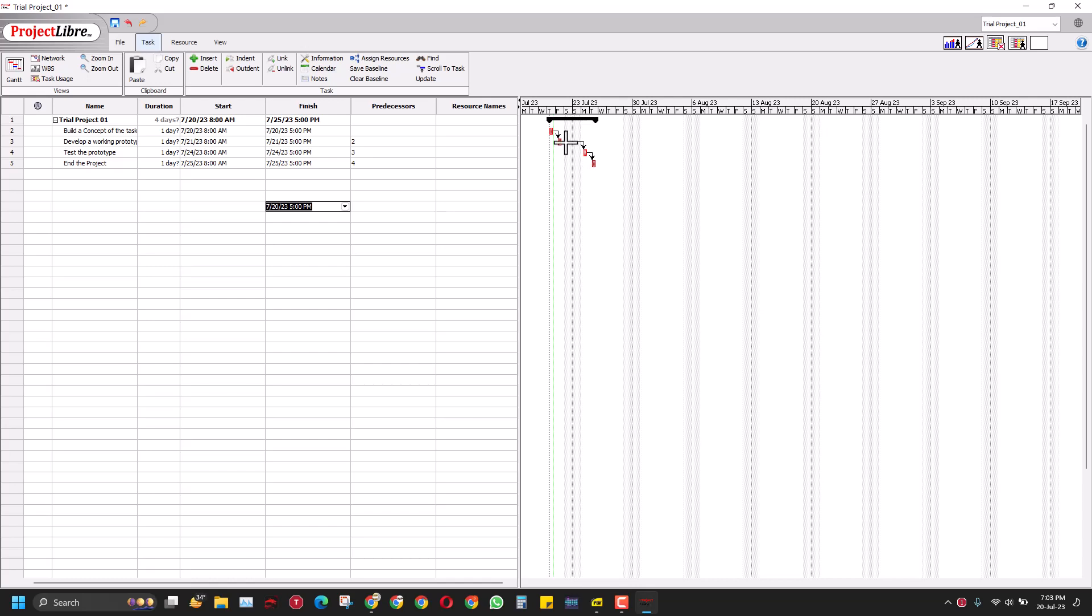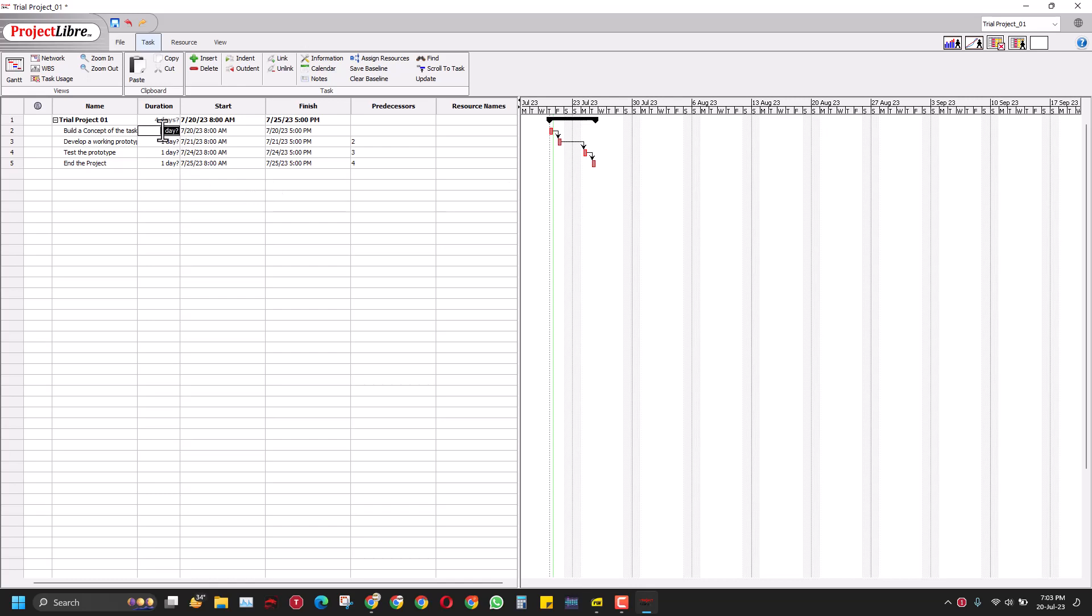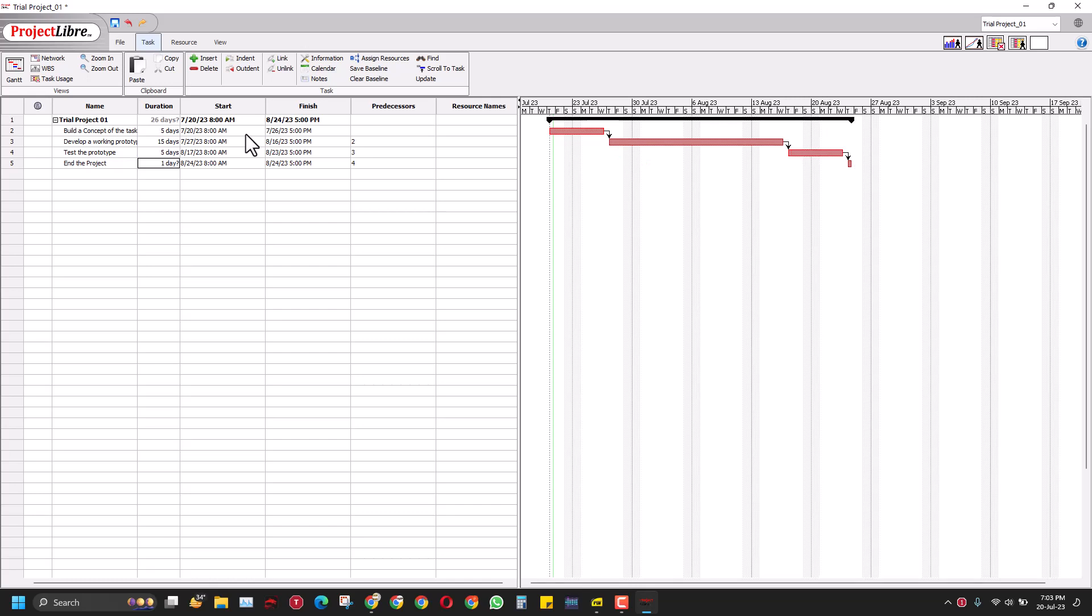You can see there is a gap here. That gap is because there is a Saturday and Sunday in these activities, which is a non-working day as per the standard calendar. So even though the activity ends and the next activity starts in one day, it still has that Saturday and Sunday in there. Let's give some days to this task: call it five days here. For the prototype let's take 15 days. For the testing of the prototype I will take five days. For the end, it's an end date, so you can make it into a milestone by making it zero day. This converts itself into a milestone.